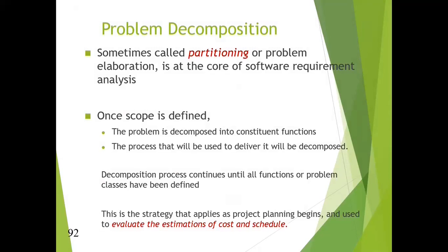Problem decomposition. Sometimes we can call it partitioning or problem elaboration. It is at the core of software requirement analysis. Once scope is defined, the problem is decomposed into constituent functions, or the process that will be used to deliver it. The decomposition process continues until all the function or problem classes have been defined.